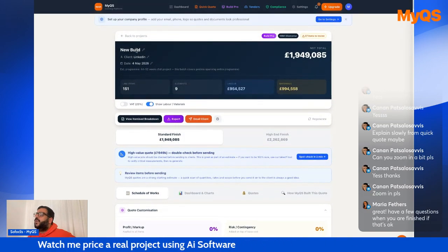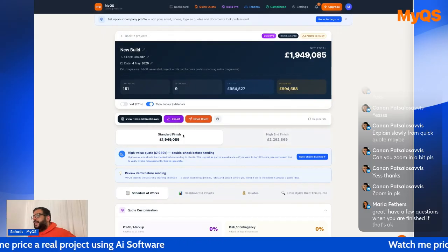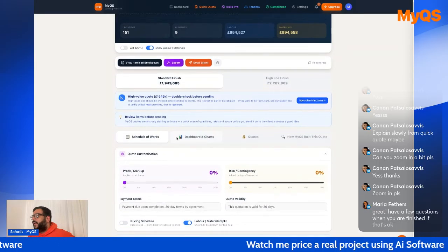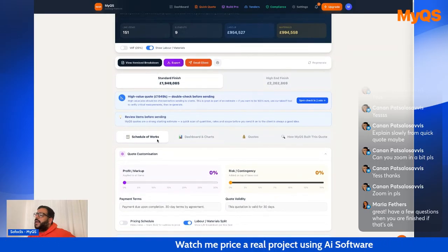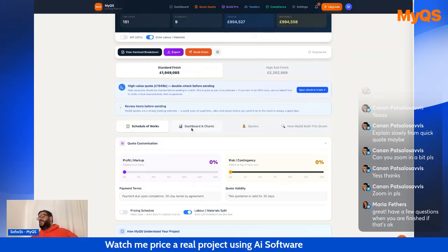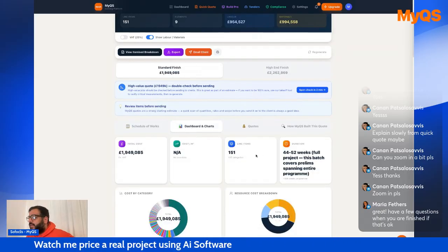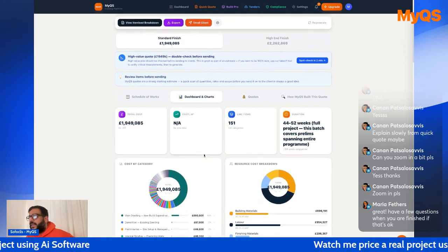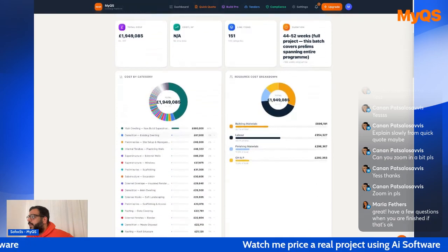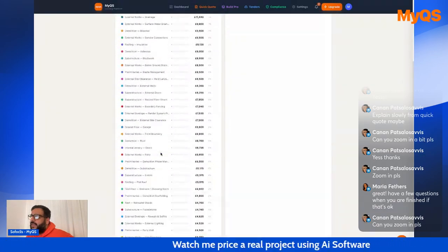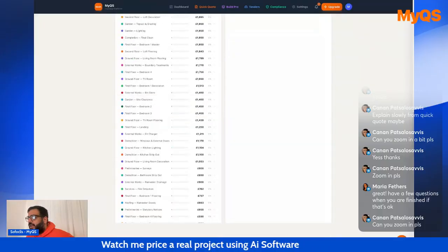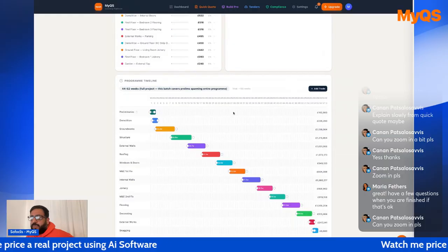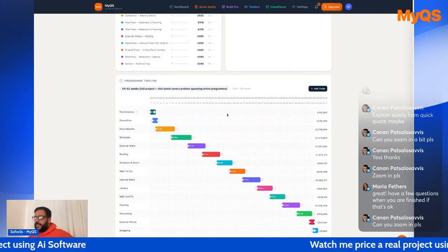Okay, so you've got your titles, high-end finish or standard finish. There is no such thing as a low-end finish. There's no point doing any projects that are low-end. So it's always a standard or a high-end. You've got your schedule of works, which is what we just saw, and we'll see again. You can see your dashboard and charts. So this is broken down your duration. 52 weeks is about right for a new build property of that size. So it's told me exactly what it's extracted. It's also given me a mini Gantt chart. Once I scroll down, it's given me a mini Gantt chart here in the program title, which allows you to include this into your tendering.